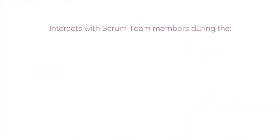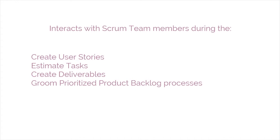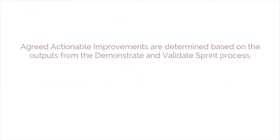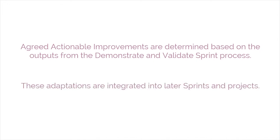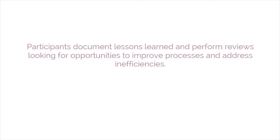The Scrum guidance body interacts with Scrum team members during the create user stories, estimate tasks, create deliverables, and groom-prioritize product backlog processes to offer guidance and provide expertise as required for the team to adapt to necessary changes and challenges. In the retrospect sprint process, agreed actionable improvements are determined based on the outputs from the demonstrate and validate sprint process. These adaptations are integrated into later sprints and projects. In the retrospect project meeting, participants document lessons learned and perform reviews looking for opportunities to improve processes and address inefficiencies.